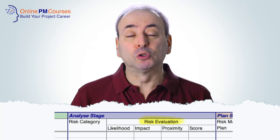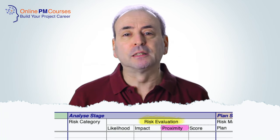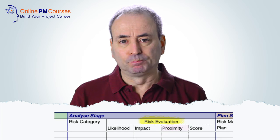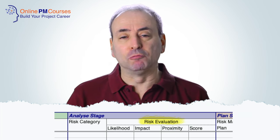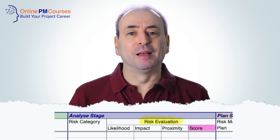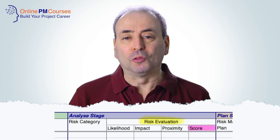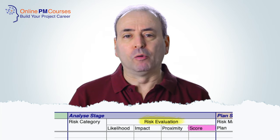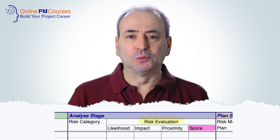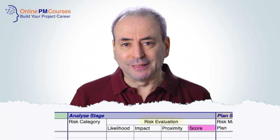You may want some sort of proximity measure to recognise that a risk that could happen tomorrow is one you'll give more attention to than one happening in a year or two. And you may want a field with some form of consolidated risk score — severe or not severe, high/medium/low, red/amber/green, or 1/2/3. It doesn't matter what scoring mechanism you use, because unless you understand the mathematics deeply, you want to stick to a mechanism that allows you to make decisions rather than drive quantitative evaluation.